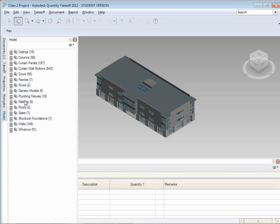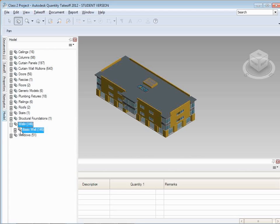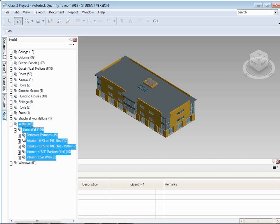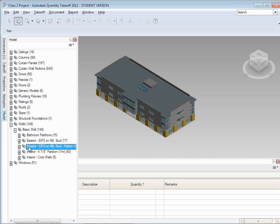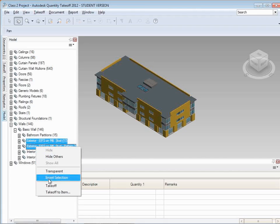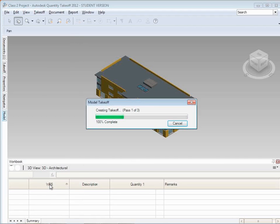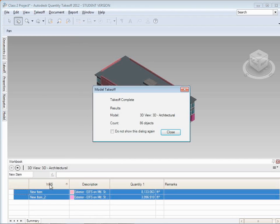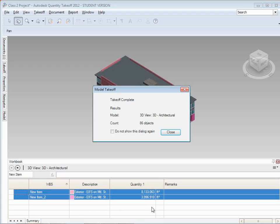There's a model tree. And I can choose specific things. Like I can choose all the wall elements. Or I can choose specific types of walls. And for anything that I want to take off, if I just want to know all the EIFS walls, I can choose those and right-click and say, take them off. And what it's going to do is go through the model and actually report to us that there are 86 objects, which resulted in 8,133 square feet of one type of EIFS wall and 3,996 square feet of the other type.